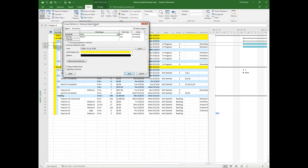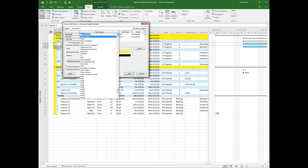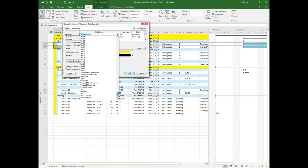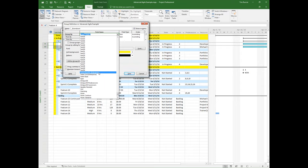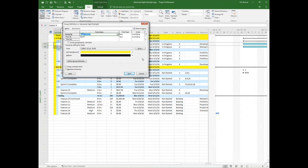But let's take a look at burndown. I'm going to click on edit. And you can see here as you come in and says, I'm going to group. Well, what field would you like to group by? And you can do it by status manager. You can do it by any of your custom fields. In fact, if you're dealing with an enterprise environment, you can actually group it from the enterprise fields as well, locally at a desktop level. A lot of times with the project online or project server, the enterprise approach is that we build one view, one filter, one custom field, and then anybody who connects inherits that automatically. So we put that in that enterprise global template.